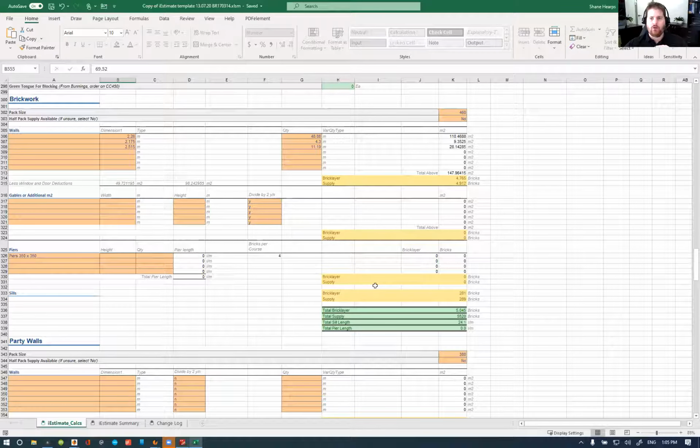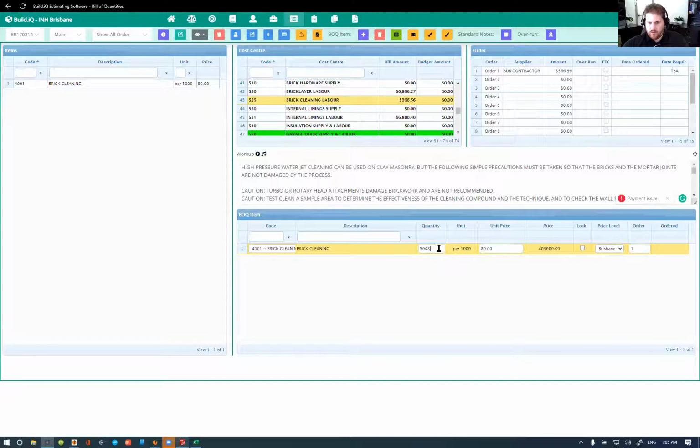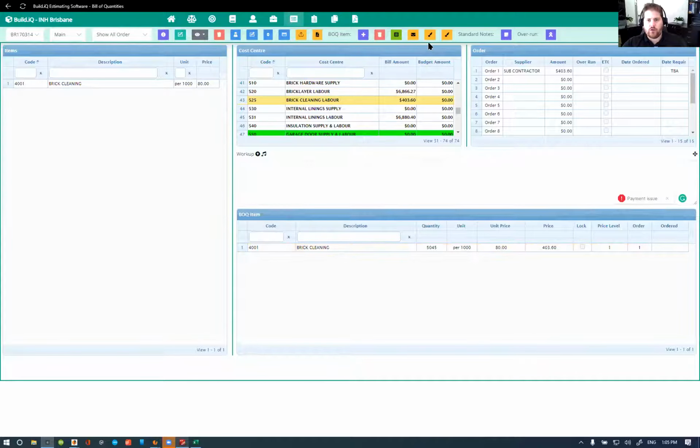Probably partly because our general heights were different to begin with, being that the plans have kind of been drawn showing a drop-off height that's unachievable. But secondly, the extra bricks throughout the alfresco above the door have not been allowed for. So we would have been shy on bricks 5045 by quite a considerable sum.